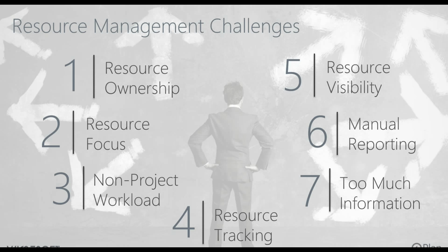On a resource-focused basis, resources get hit with assignments from a variety of different places. If they have too many things on their plate, if there are competing priorities, or if it's not clear what the priorities are, the resource focus can lead us to working on the wrong things, or by stopping and starting, not getting done in an effective fashion. Also, non-project workload. In project and portfolio management solutions, we tend to focus on the project management demand. But there's also a lot of non-project workload for a lot of resources, especially ones in more of an operational type of role that maybe do some project work. If we're not factoring in that non-project workload, we can actually be overcommitting resources and thinking we have bandwidth for them that we don't actually have.